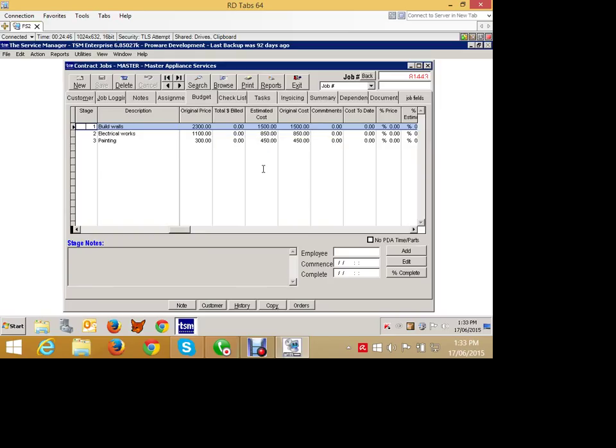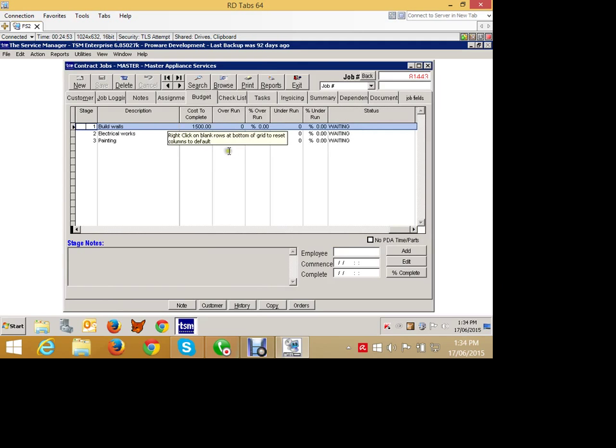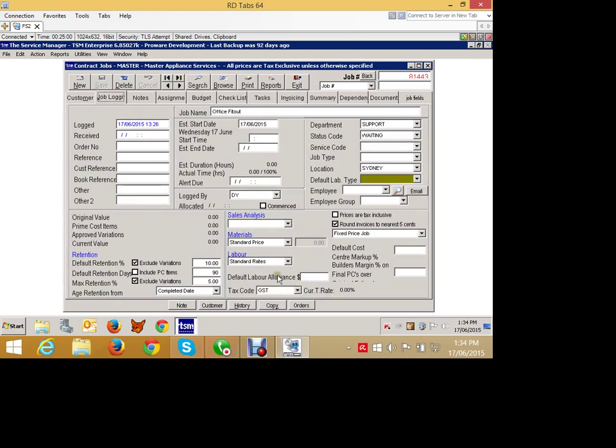The costings come at a different timing to our billing cycle. Okay? So the cost to complete is a very important figure to understand, because regardless, if I invoice them right now, and the job's coming in at the moment at $4,075, you might say, well, we've made $4,075 profit because we've not incurred any costs. But that's not the case. We have to take into account the cost to complete in order to work out the profitability of this particular job.